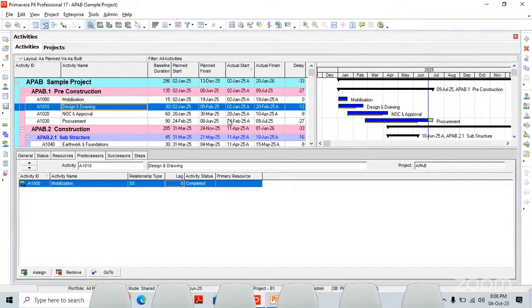Yes, I'm clear. Because in my company, on the projects I handle, where there is a delay, there is a place where you put the delay variance explanation analysis. Any delay above 4 days or whatever, you have to get the reason why the delay happened.